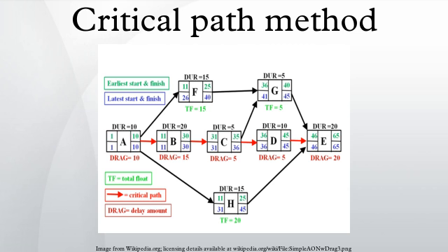In project management, a critical path is the sequence of project network activities which add up to the longest overall duration. This determines the shortest time possible to complete the project. Any delay of an activity on the critical path directly impacts the planned project completion date. A project can have several parallel near-critical paths. An additional parallel path through the network with total duration shorter than the critical path is called a subcritical